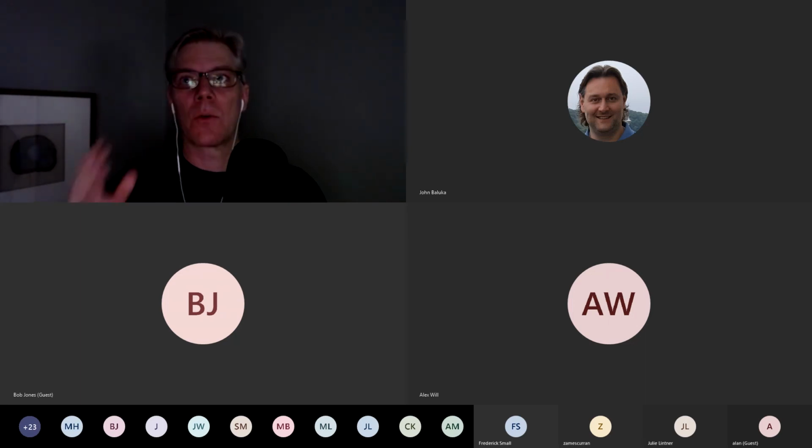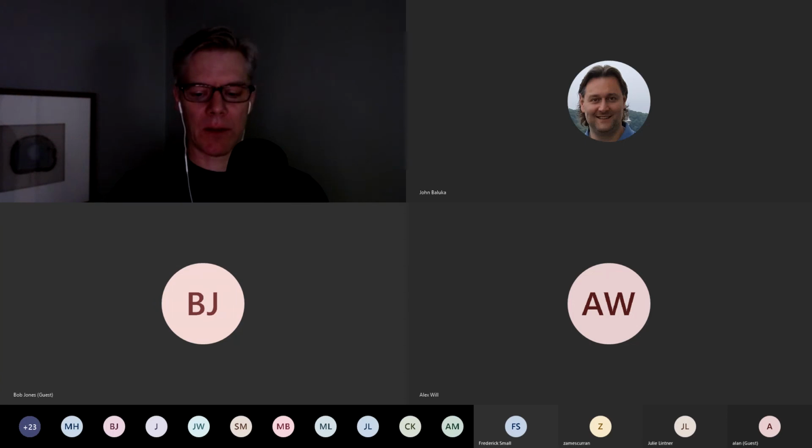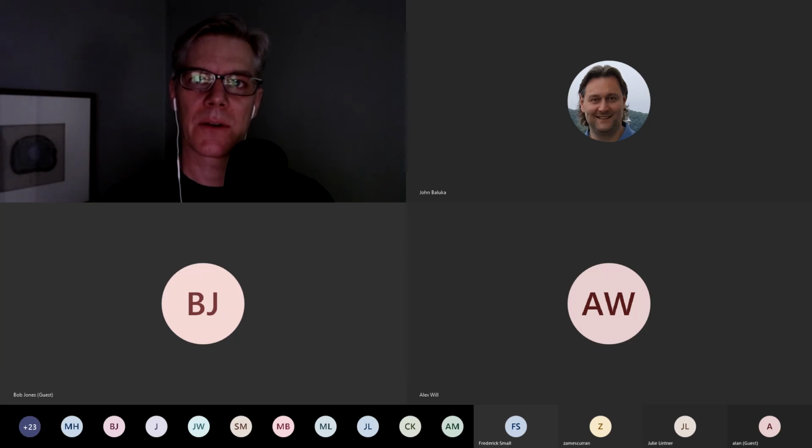Okay, so I think that's everything I had. The transition move is to just do this one thing differently. If you want to try it on a small project, don't take a huge risk. Try it on a smallish project that you're going to estimate by the hour, and then take your hourly estimate, multiply it by 85%. And if you're comfortable with that number, you send that proposal to the client with the two options. We guess it's going to be 10,000, or we promise it'll be 18,500. And I think you'll be surprised. A lot of clients are going to pick the higher one.